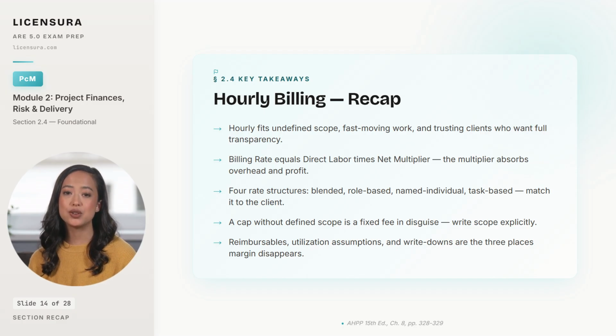The biggest operational trap is the not-to-exceed cap without defined scope behind it. That structure is a fixed fee in disguise, and unless the agreement names the work the cap covers and a procedure for billing scope beyond it hourly outside the cap, scope creep will consume your margin while the client believes they are paying you fairly.